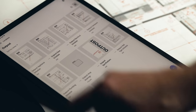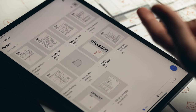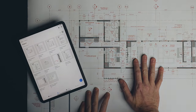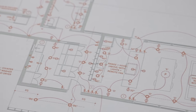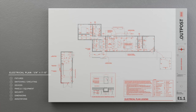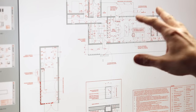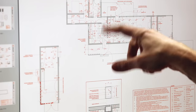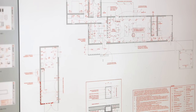Some of the other schedules we might have include an appliance schedule, electrical schedule, finish schedule, window schedule, and plumbing schedule — all helping to paint additional context to our drawings and specifications. To round out the architectural set we have electrical drawings. Instead of reflected ceiling plans, I typically do an electrical or power plan showing all the light fixtures and switching. Even these reference schedules — the D1 light in the schedule tells you exactly what it is, the model name, color, and how it's lamped. The electrician can go through the drawing with every fixture and determine quantities, finding all the information referenced at some point in this set of documents.